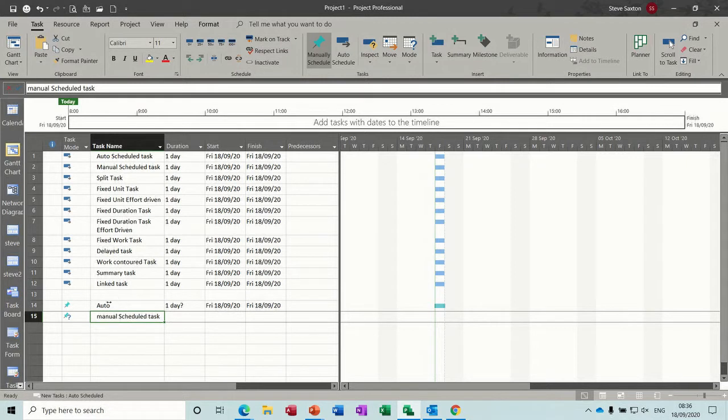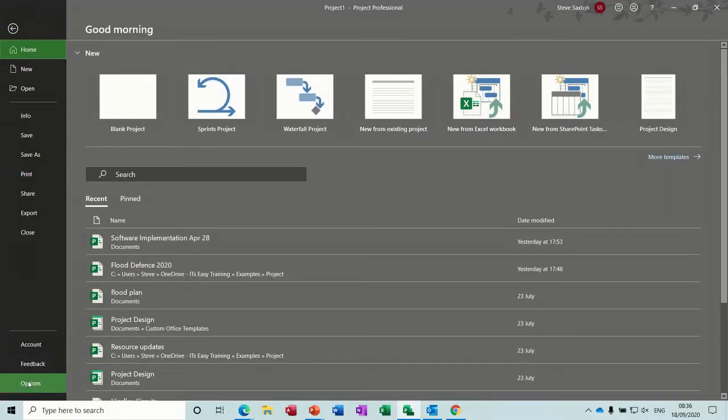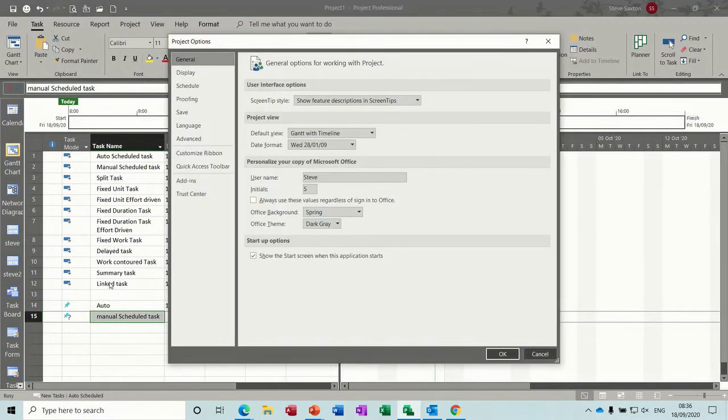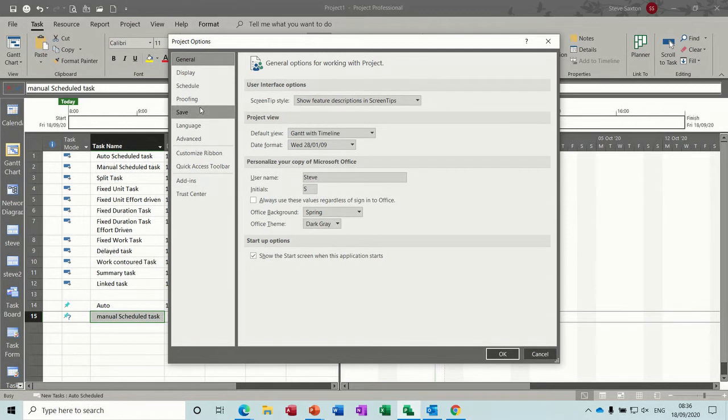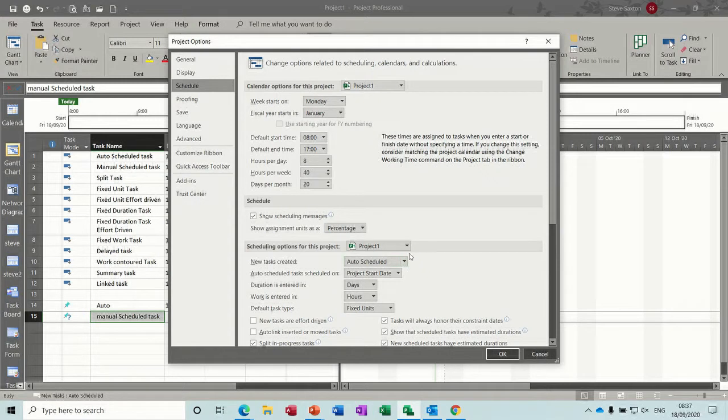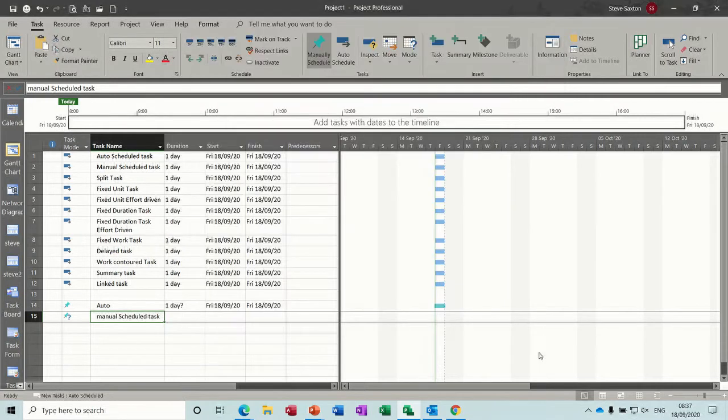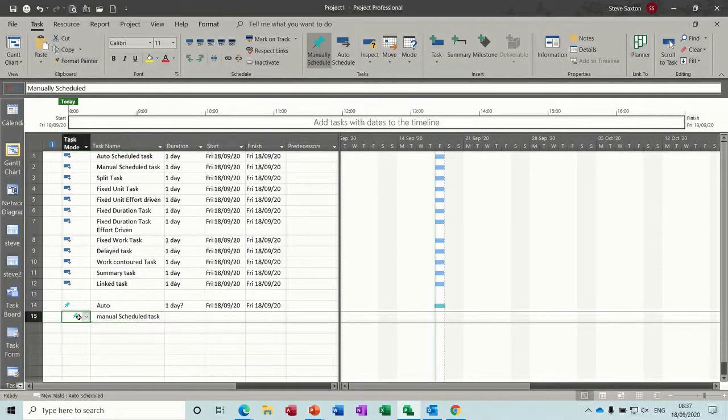Now to change the automatic settings you've got to go into options. So that is file, options down the bottom, and then you are going to schedule and you are changing this. New tasks created to auto-scheduled for all new projects. That's what I've already done. So that's what you'd want to do if you need to change yours. Otherwise you are doing this manually.